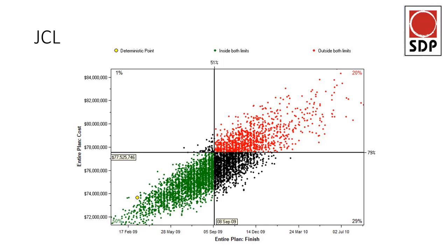Is this risk averse? Is this risk neutral? Is this the right level at which projects would want to make a final investment decision or approve for construction? That depends on the risk tolerance, risk appetite, or risk criteria, whatever you want to call it, of the project owner at the end of the day. Typically, my advice, especially where a project owner has a portfolio or program of projects, where there's a bit of a portfolio effect, is you would go for the P50, but then hold a management reserve outside of the project, the delta between a P70 and a P50.